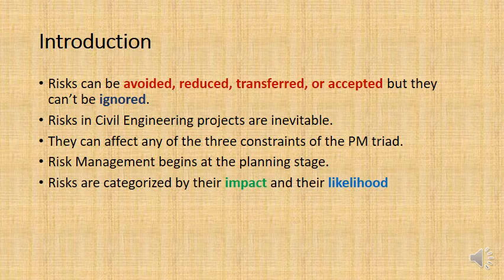I would say 1 in 10, 10%. Potentially 1 in 10 people get sick every week for maybe a week or so every year, just with colds and so forth. The impact, though, will be quite small, especially if there's some slack in those activities. So keep that in mind too.